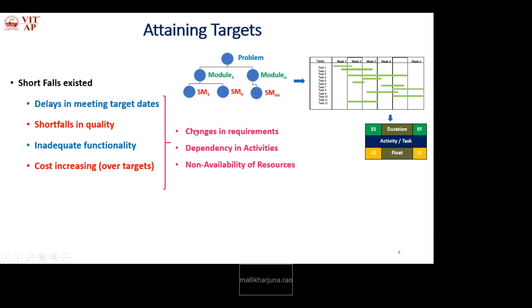So when we are trying to incorporate changes in the existing functionalities, are all the existing functionalities supporting the changes or not? If they do not support them, we have to make them support the future changes, because we are working for the client. As per the client's need, we have to accommodate these changes in the existing functionality. So when we try to incorporate these changes, definitely delays will happen in the project schedule.